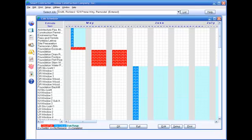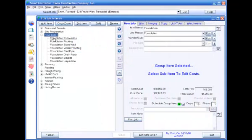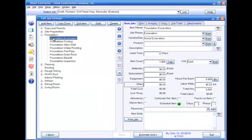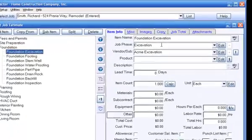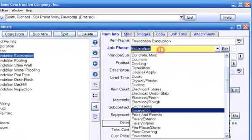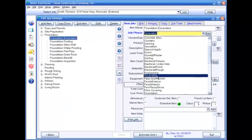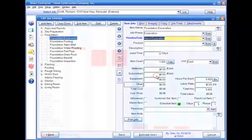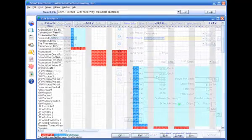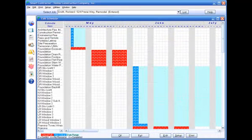How does Smart Contractor do that? Remember that when you set up item information in the job estimate, you can assign a job phase to the item. The job phase tells Smart Contractor what sequence items in the job must be completed in.